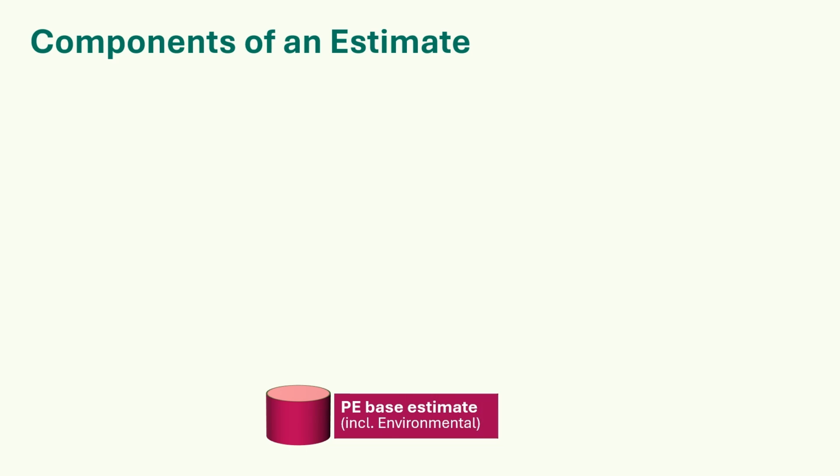You should have already developed your project estimate using one or more of the many tools WSDOT has for this. To recap, you should have a preliminary engineering base estimate in today's dollars. This is your budget for your entire design phase, including environmental, permitting, consultants if any, communications, open houses, survey, right-of-way plan preparation, and all specialty services and subject matter experts that will be charging their time through final design closeout. Don't be caught off guard with the potentially significant expense of the advertising phase of work.